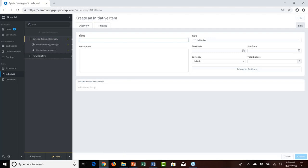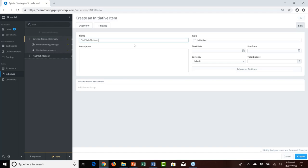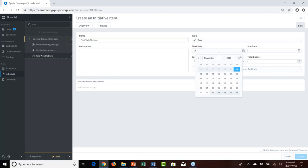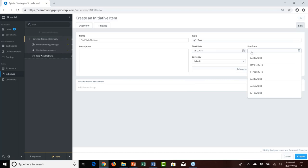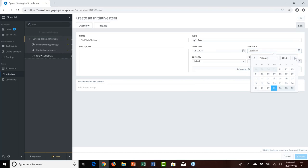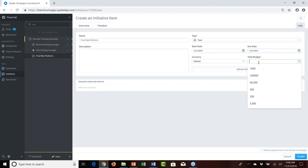We'll set up another task within the develop training internally initiative: 'find web platform' — the implication being for delivery of training material online. This is set up as a task with a start date of December 1st, 2018, a due date of January 31st, 2019, and a budget of $5,000. Click Create.